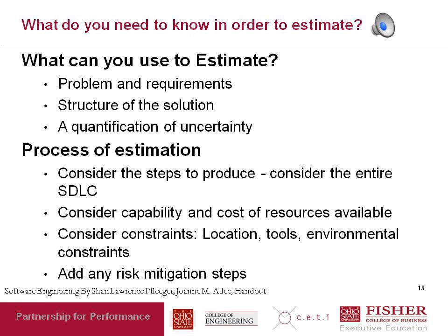And of course, you have to consider the cost of the resources available. Because part of estimation is effort, and the second part of estimation is cost. So you estimate higher if the resources you are using, both personnel resources as well as computing resources like systems and so on, were more expensive.